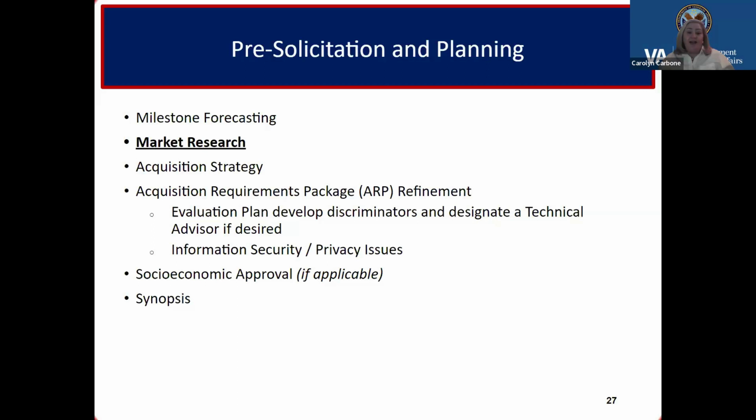The AHRQ refinement. You'll assist us if we have an evaluation plan, if it's going to be a best value solicitation. You're going to help us come up with discriminators, designate a technical advisor. So you're going to really make up that evaluation team for when proposals do come in. And you want to make sure that you have a lot of input into the plan itself, so that when we're determining how we're going to evaluate somebody in terms of their technical performance, you're aware and you have input into that, because we rely on your technical knowledge to really be able to do that.